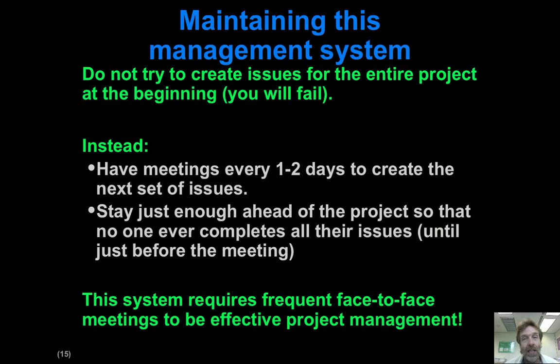For big projects that are going to take months or years to complete, you need to have yet another management or design layer on top of this that may take this big project of 6 months or a year and reduce it to a set of milestones, or version 1, version 2, version 3, version 4, which incrementally build up the functionality. Normally these releases are commonly 4 to 6 weeks.